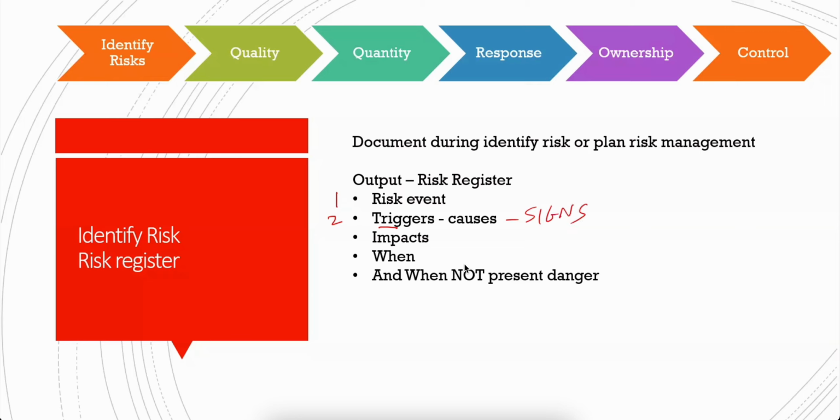So what is a trigger that a hurricane is going to be coming to Houston? What is a trigger? Well, weather report, right? Weather report is your trigger. Keep an ear on that. Keep listening to the weather, and that's your trigger. So it's good to have the trigger in your risk register.